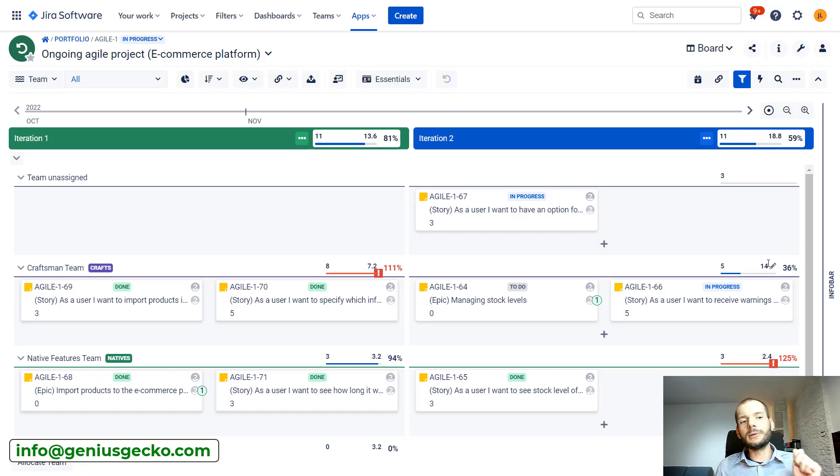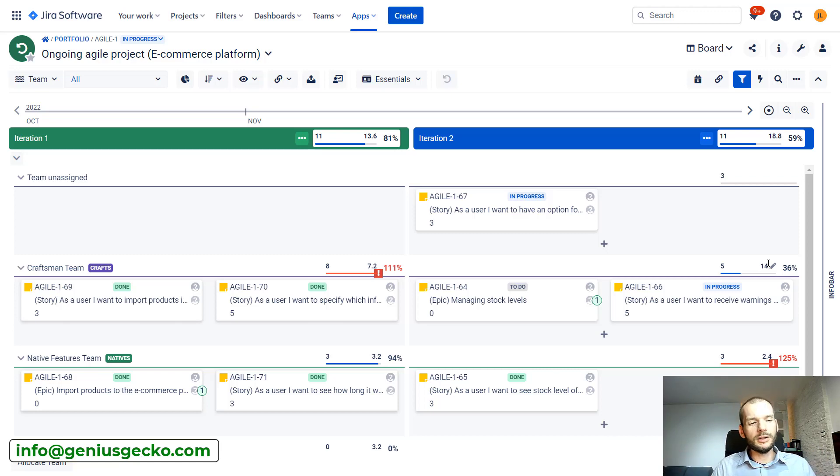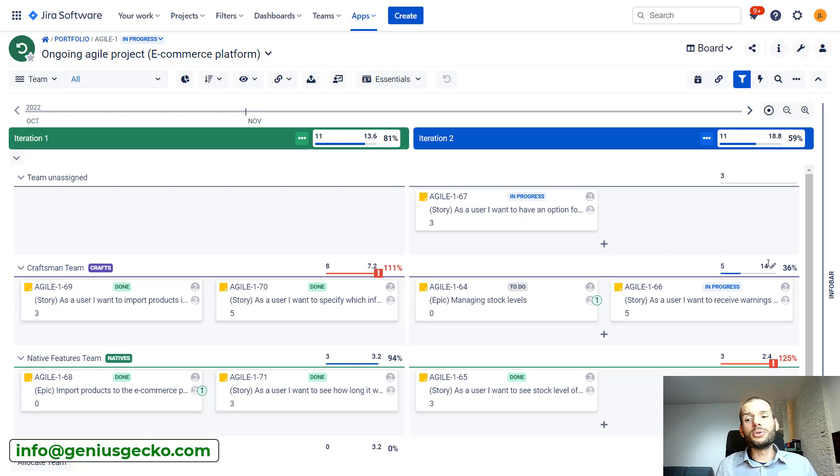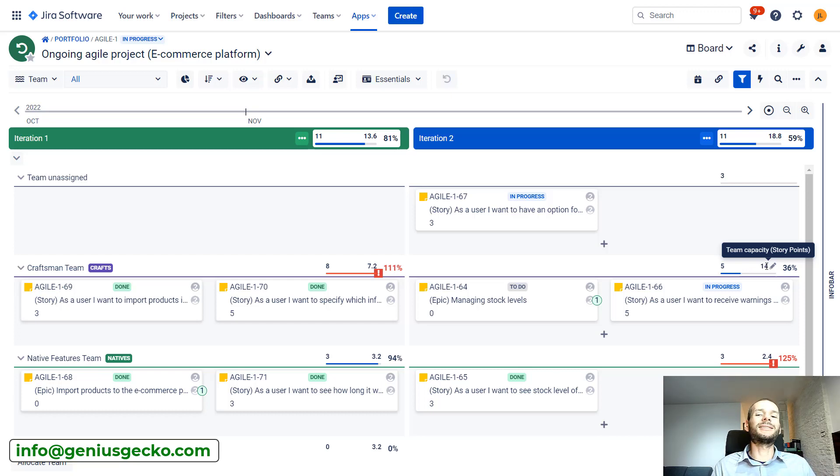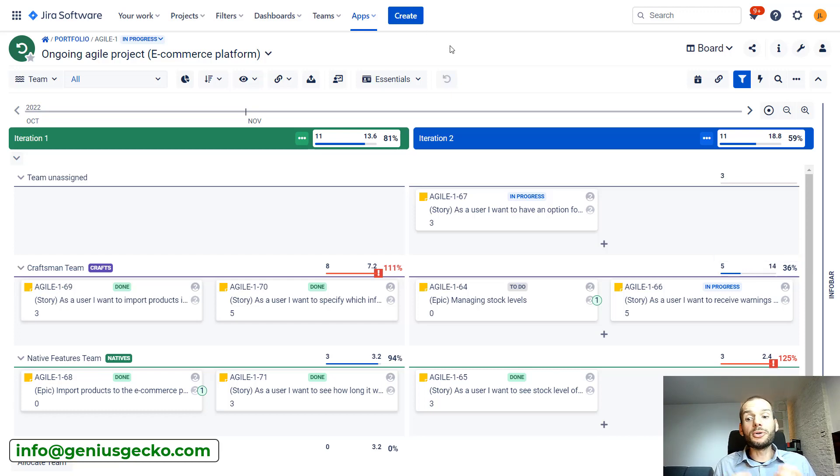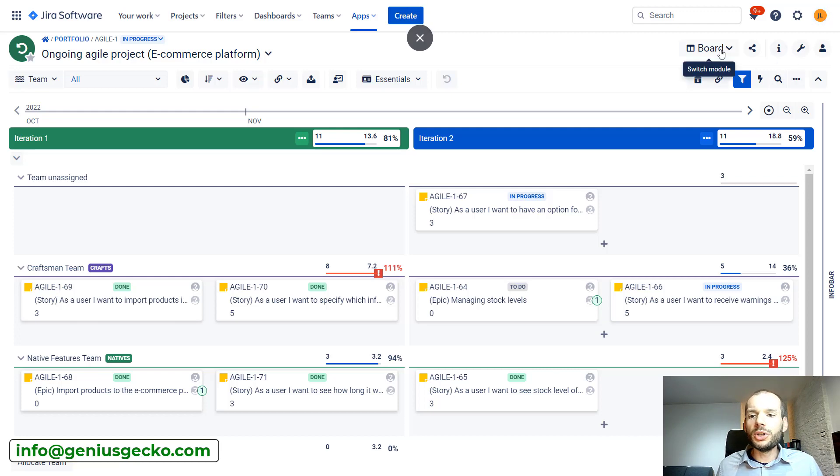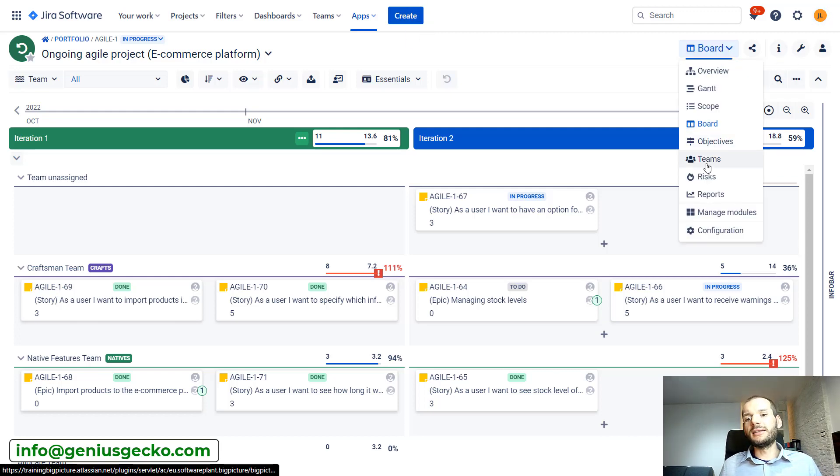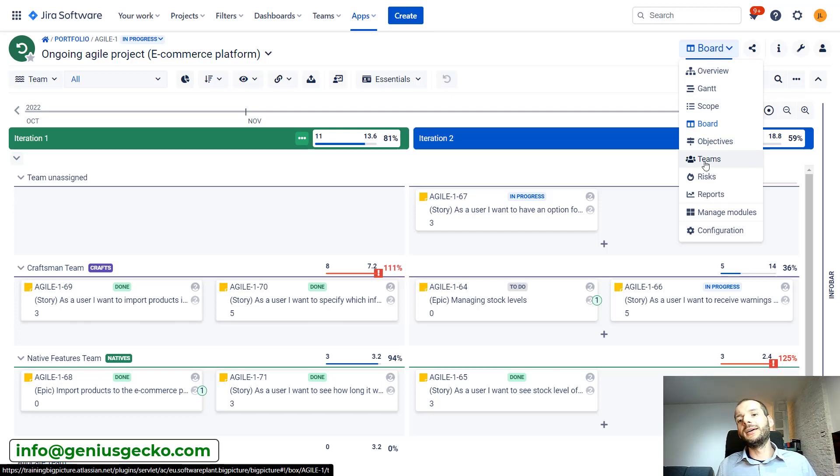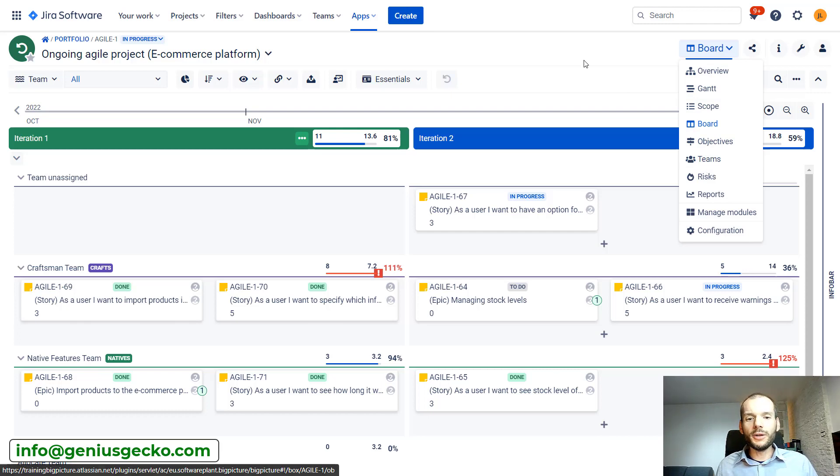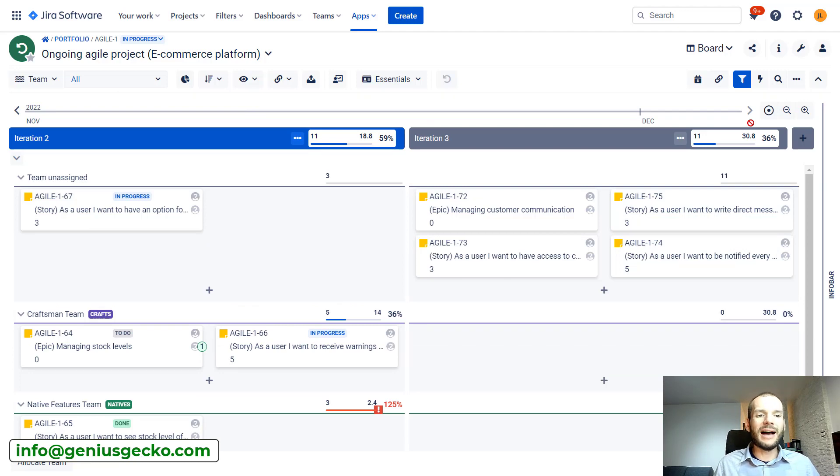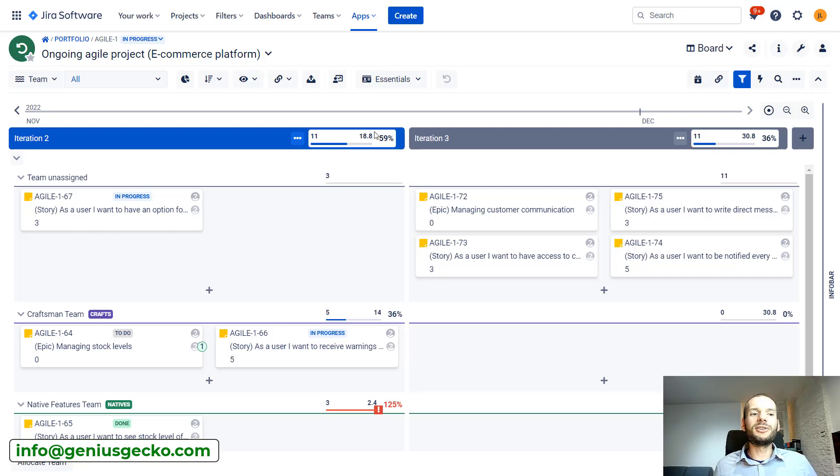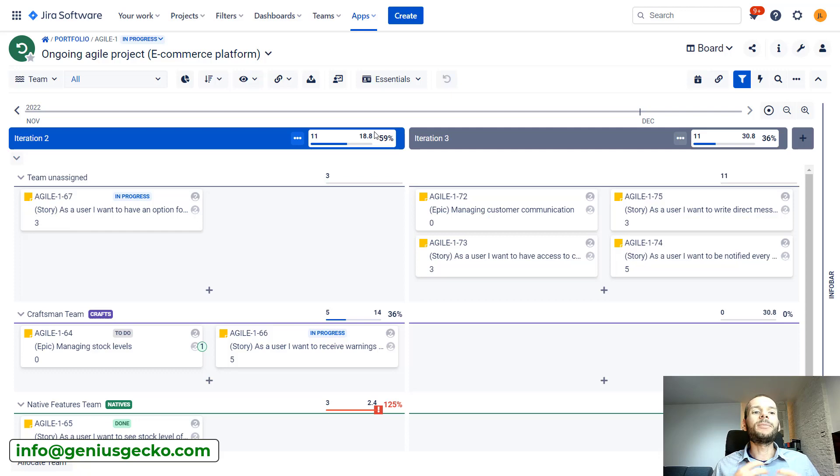Very often I've seen that if a person is one or two days off during the iteration and everyone is working the whole iteration, then scrum masters and teams in general do not really want to affect the numbers over here. They just assume that this is not big enough impact on capacity to reflect this over here. But you can see that if we do that kind of change, maybe we change the team membership or maybe we change someone's workload plan, all the iterations in the future that are basing on this calculation will be affected.